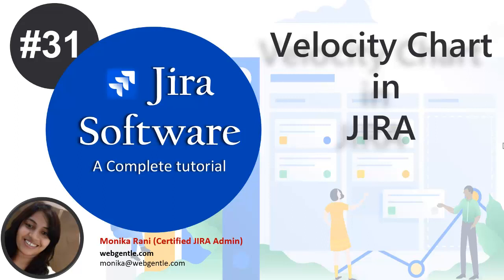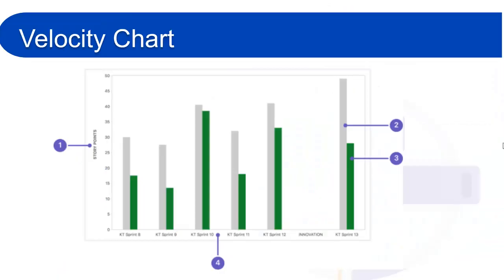Now we will see how the velocity chart looks and how you can read it. In the X-axis we have the number of sprints, and in the Y-axis we have the estimation statistic. The estimation statistic could be story points, hours, number of counts, business value — whatever you have already set in your board setting for estimation statistic.